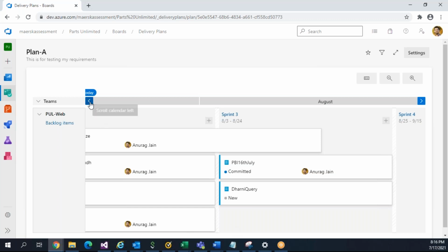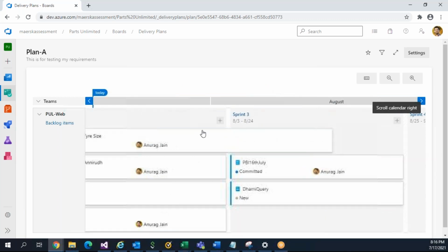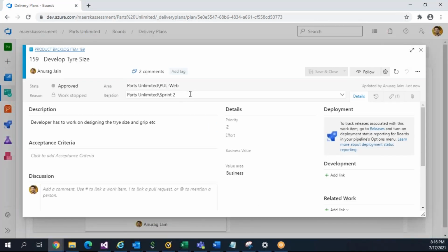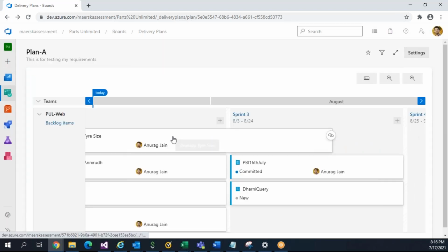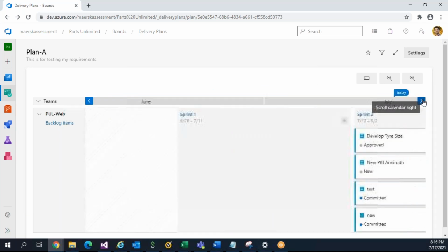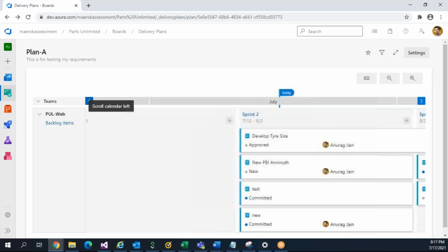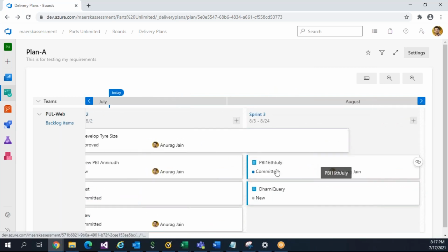So this item belongs to both, but technically it is in sprint 2. If you open this, it is sprint 2, but what happened is, you can feel like, okay, this item we started in sprint 2 but it's not completed, and you are not moving it to sprint 3. But here you can see, okay, this was started in sprint 2 but it is spillover, it wasn't completed, and it extended up to sprint 3 also. So it's like a next kind of view for better management, like what all tasks have spilled over from one sprint to another, and what happened to those. So you can do all these things in this.